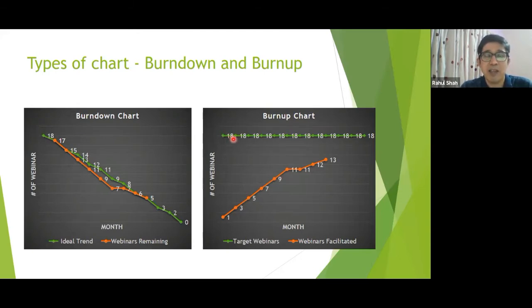points. Now we are saying in the agile world that we respond to change. So the project manager or product owner can add some user stories. So instead of 180, it might go to 200. If it goes to 200, I will know when it has increased to 200. Or if it goes down to 170, I will know. So I will know that if you look at this data, it is not making any progress.